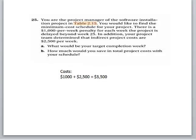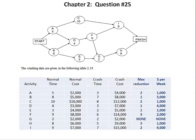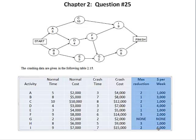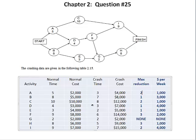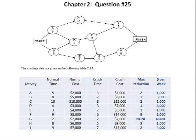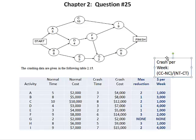Let's go to the next page. You can see this is the AON diagram. I'm not going to show you how it's constructed because we're already far in the game — you should already know how to do this. They give you activity normal time, normal cost, crash time, and crash cost in the table. You have to figure out the maximum reduction, which is normal time minus crash time, and the crash cost per week using this equation: crash cost minus normal cost over normal time minus crash time.